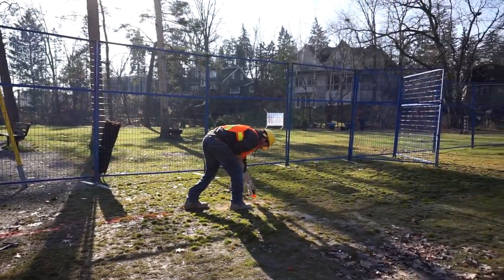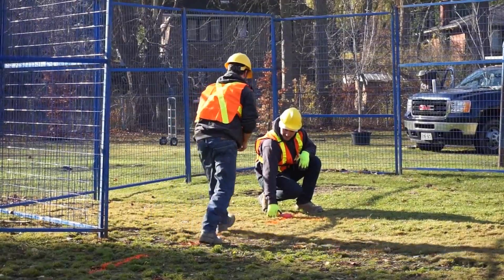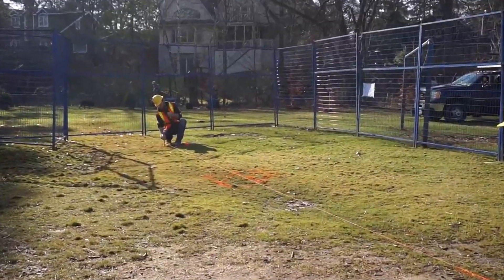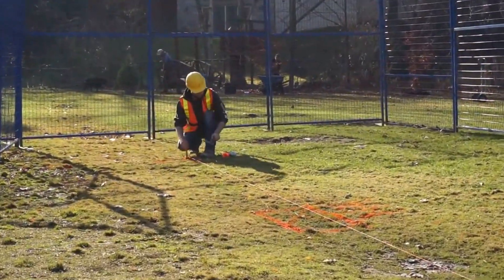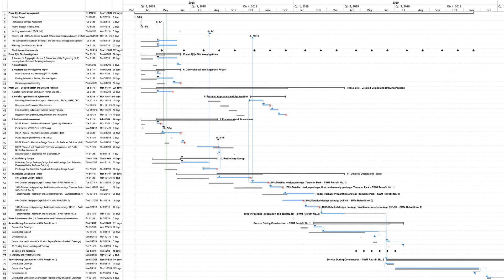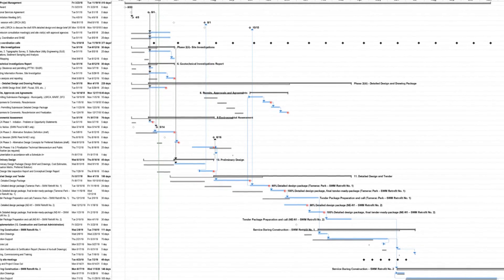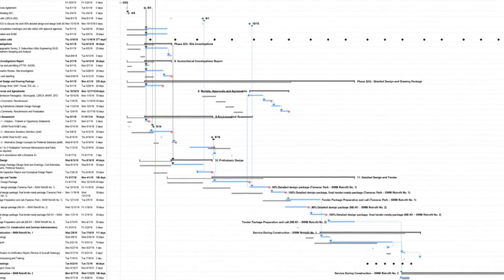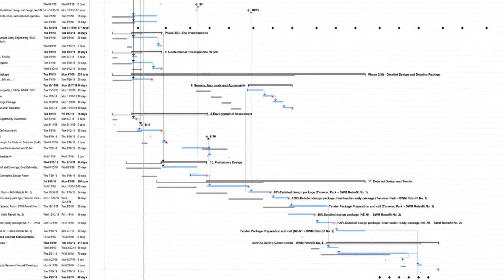Be sure to know the details of your site. This should include doing a pre-construction site investigation and an underground utility locate search for both public and private infrastructure. It is important to schedule all aspects of the project in advance. The LID features should be constructed at the appropriate time in order to minimize disturbance from other construction activities.